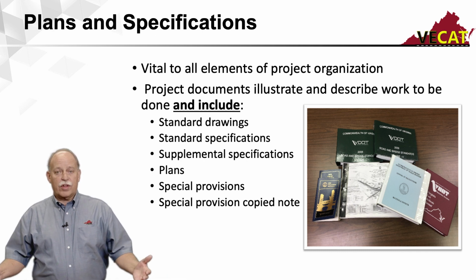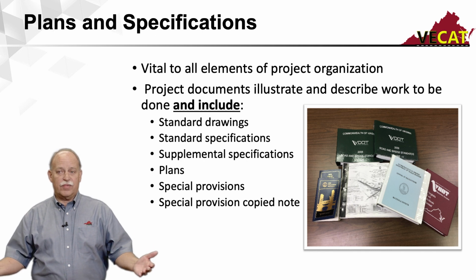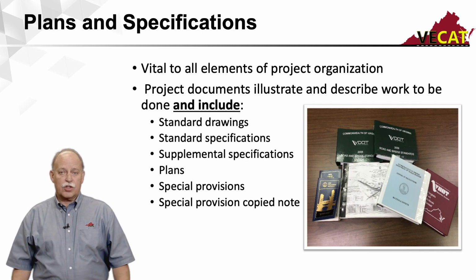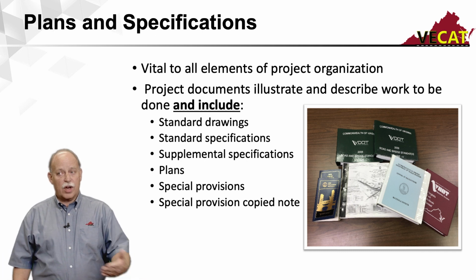And those include everything from standard drawings. So anytime you have a specific drawing that seems to reoccur, a lot of these might be drainage structures and things like that, that the same sort of design is necessary for all projects, they'll create a standard drawing for that. So you'll have a whole series of standard drawings. They also have a series of standard specifications. So that's that book.